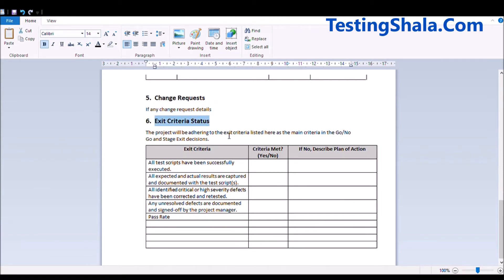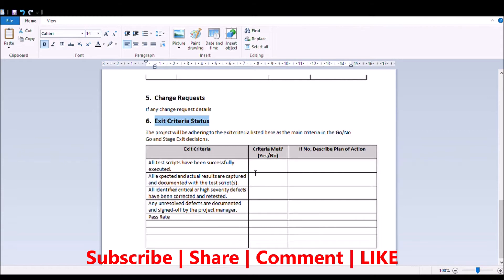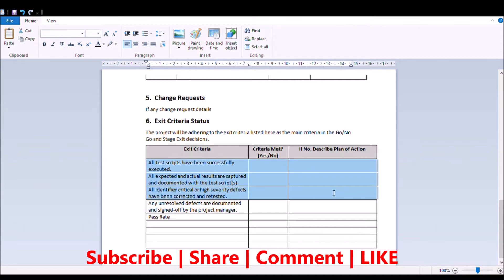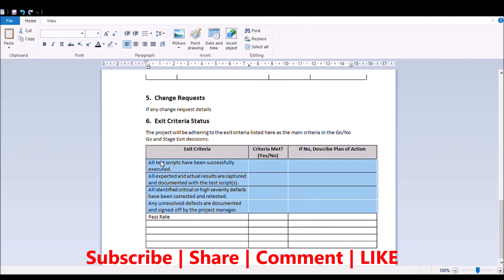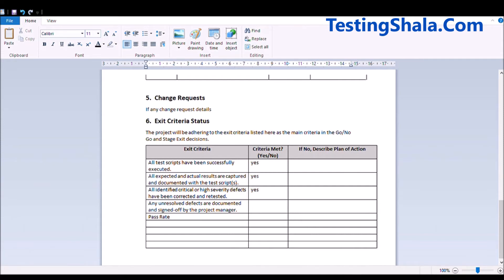Whatever exit criteria we defined as part of the test plan, we will have to put a table here and against each criterion provide the information on whether it is really met or not met. If it is not met, we should put an action plan explaining why it has not been achieved. The exit criteria is defined and agreed with all stakeholders when creating the test plan, and against those criteria we are going to sign off the testing project.